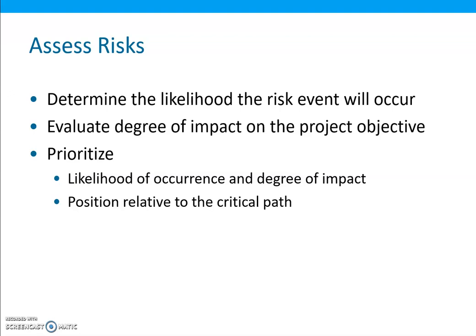The project manager, in consultation with appropriate team members or other experts who are knowledgeable about the potential risk, should determine ratings for each risk. Historical data from prior similar projects can also be helpful. For example, if severe weather is a risk, historical daily weather data or consultation with the weather forecasting service may be useful.